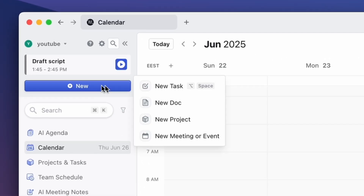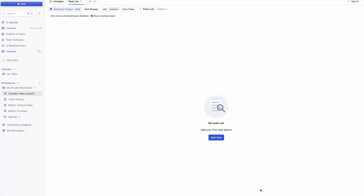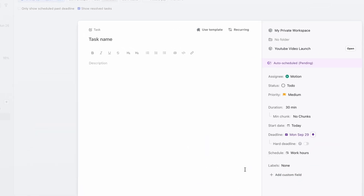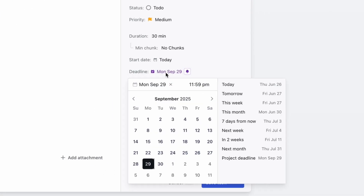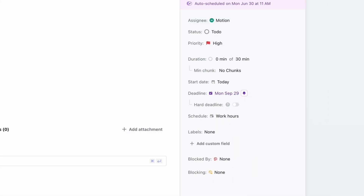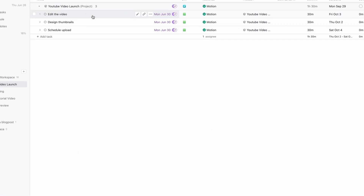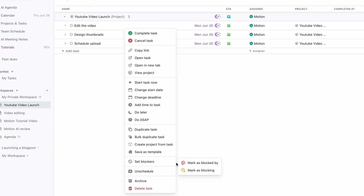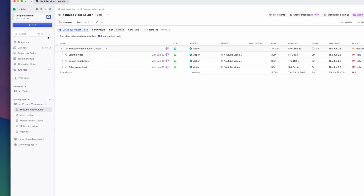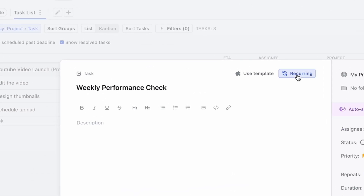Say I'm prepping for a new video launch. I'll start by clicking the plus new button, selecting project, and naming it 'YouTube video launch.' I'll add a few tasks under this project: the first one, edit the video, due Friday, high priority; the second one, design thumbnails, due Thursday; and the third one, schedule upload, due Saturday. I'll mark 'edit the video' as a dependency for 'schedule upload,' since that can't happen until the editing is done. I can also make recurring tasks, like a weekly performance check, to automate routine items.